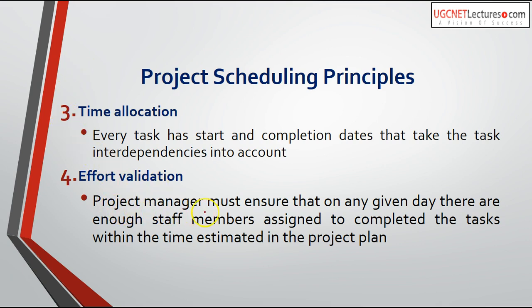Effort validation: the project manager must ensure that on any given day there are enough staff members assigned to complete the task within the time estimated in the project plan. Effort is calculated in person-months, or in person-days for daily planning. On each day, the required number of staff should be available to perform a particular task.